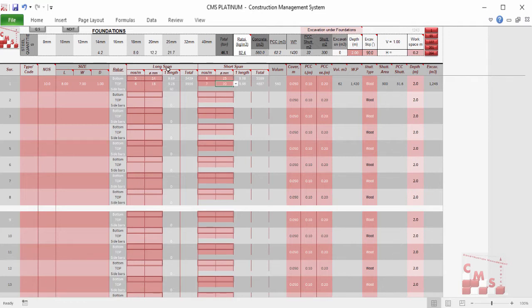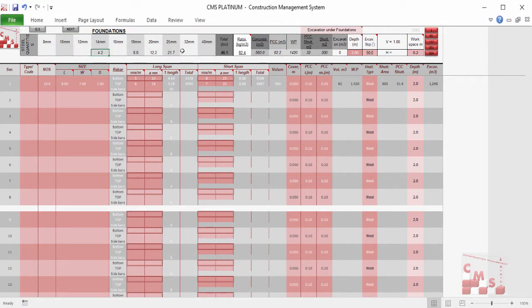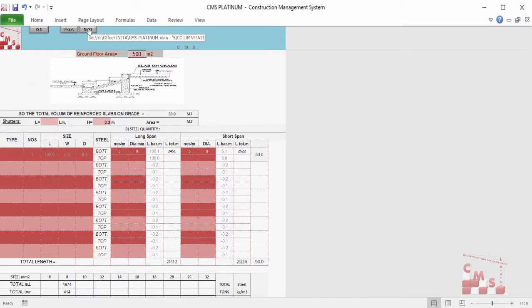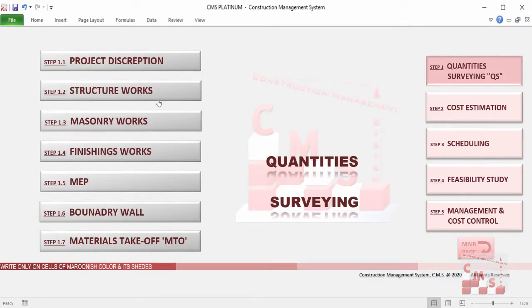We have the bottom reinforcement and top reinforcement for the long and short span. CMS directly gives us the quantity of reinforcement concrete, the quantity of blinding concrete, detailed quantities for the rebar per each diameter, the ratio between rebar and concrete, the waterproofing, and the shutters for the foundations — also the type of block or wood and the excavation quantity. The same can be done for any other type of foundation, and all outputs are reflected directly across all other project aspects.